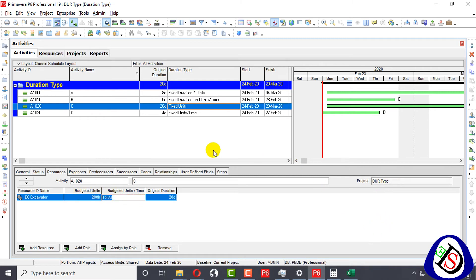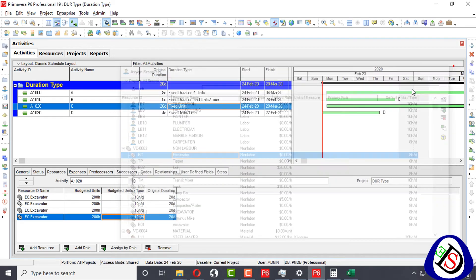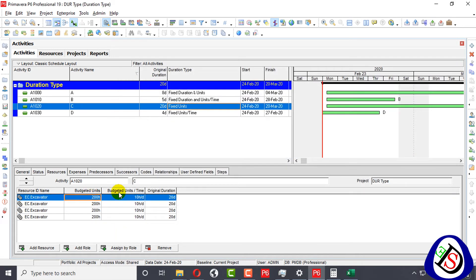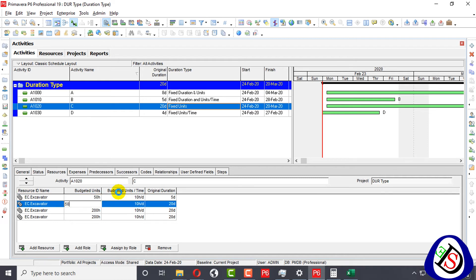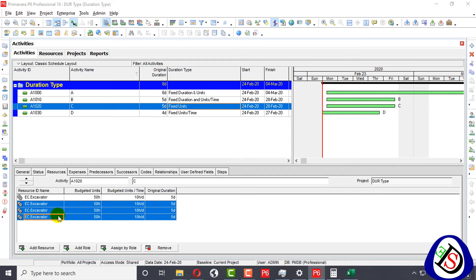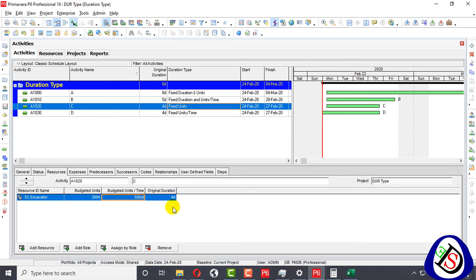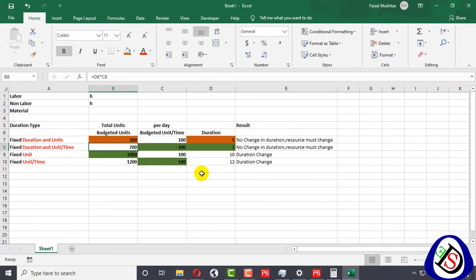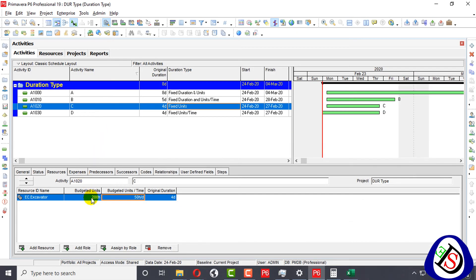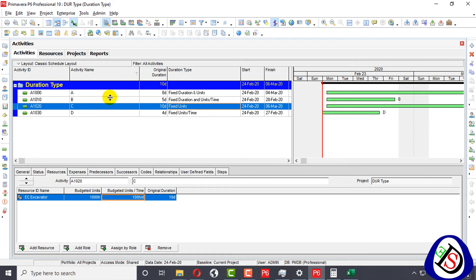For example, if I use 4 excavators and distribute the work — 5 hours each — I can distribute across all four. If I delete all resources and say I use 50 machine hours, then it will take 4 days original duration. When I put 1000 budgeted units and 100 units per time, you can see the original duration becomes 10 days. So in Fixed Units, duration changes based on the other values.